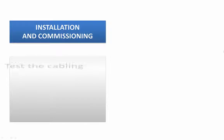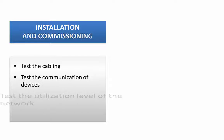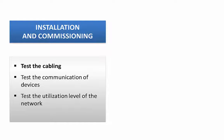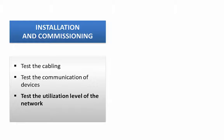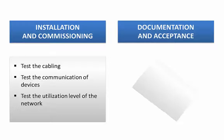In the course of commissioning, you have to check the cabling, the correct communication of the installed PROFINET devices, and the network design.